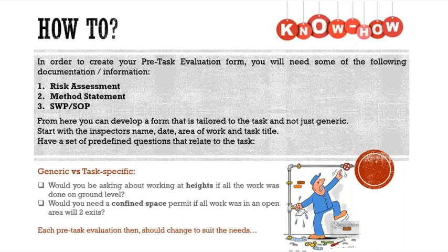Well, the risk assessment is also a step-by-step procedure of what gets done, but some steps will be left out because there's no relevant risk or hazard. It could have already been captured in a previous step. The method statement, however, is the full list of steps that need to be taken. Arriving on site, unpacking, getting things ready, signing your safety file, all of that should be part of your method statement. The safe working procedure is inside one of those steps.